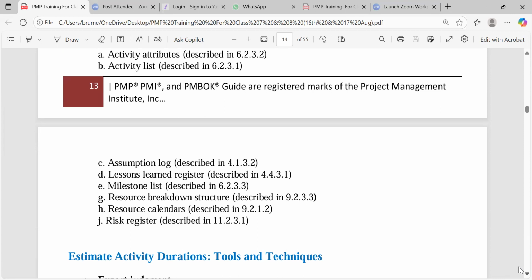On that day, we say 2 civil engineers, 1 this, 1 that, 2 earth pans, 2 shovels should be available on that day. So we can now look at the diagram. Now we may not be looking at the activity. We can just look at the diagram and it will show only the activity and where 2 earth pans are needed, where 2 civil engineers are needed. So at that level, that is a resource calendar. Does that make sense?